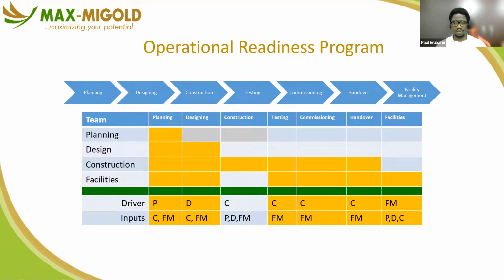So quality assurance are the steps you put in place to control the processes for the delivery, to prevent error from being available or made in the outcome. Quality control are the measures you put in place to examine the outcome to see if they are qualified as specified originally, okay? If quality assurance is done very well, quality control will pick up nothing, because quality assurance includes stopping to fix problems before a problem is translated into outputs.